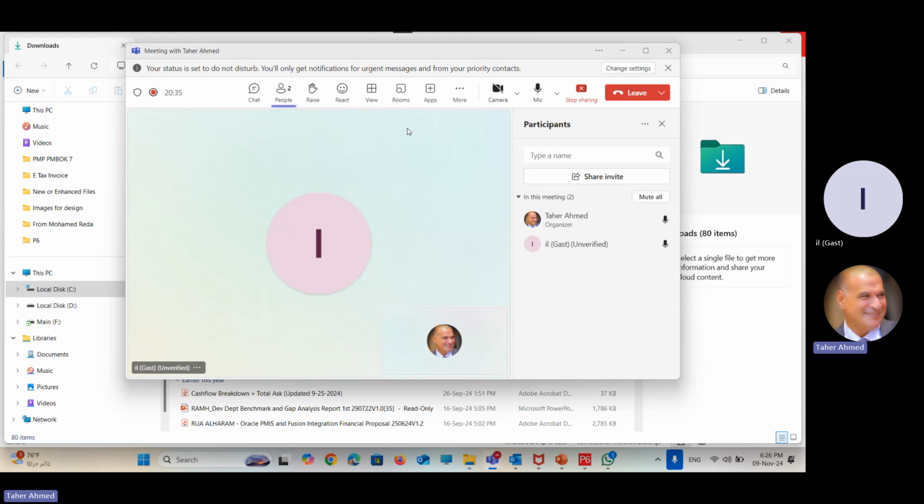We started yesterday with adding a new project. We went to File, New. By clicking New, we move step by step. In the first step, it asks you which EBS element this project belongs to. Then we move a little bit, provide the ID, provide the name, and when we say ID, it means it must be unique.